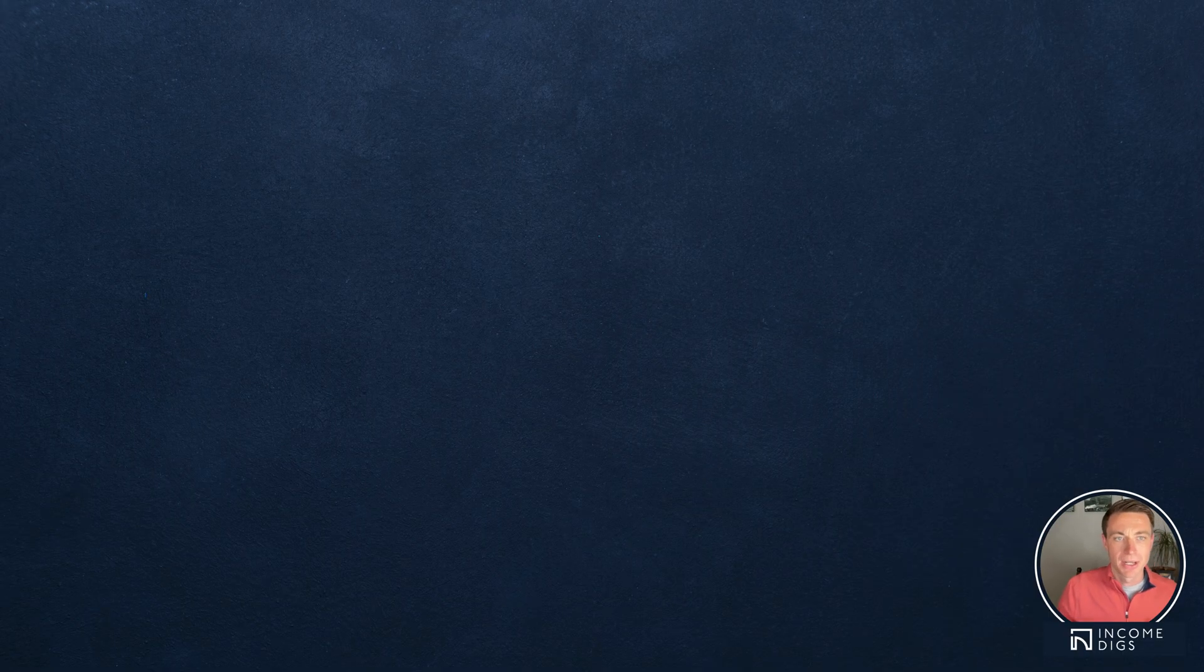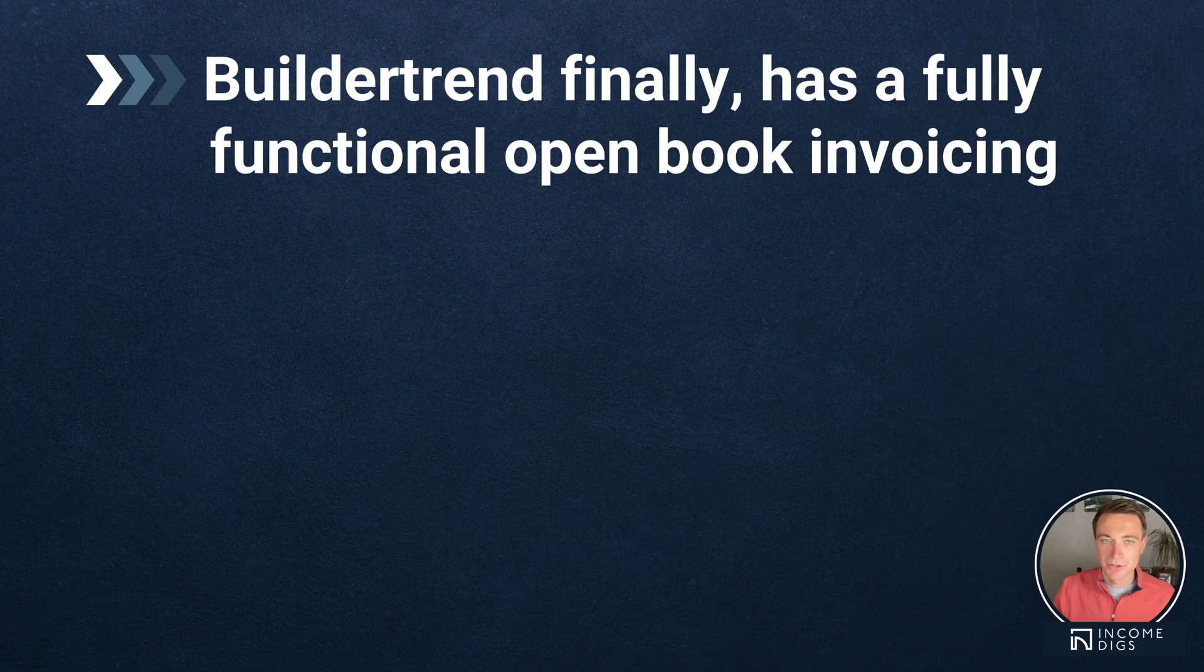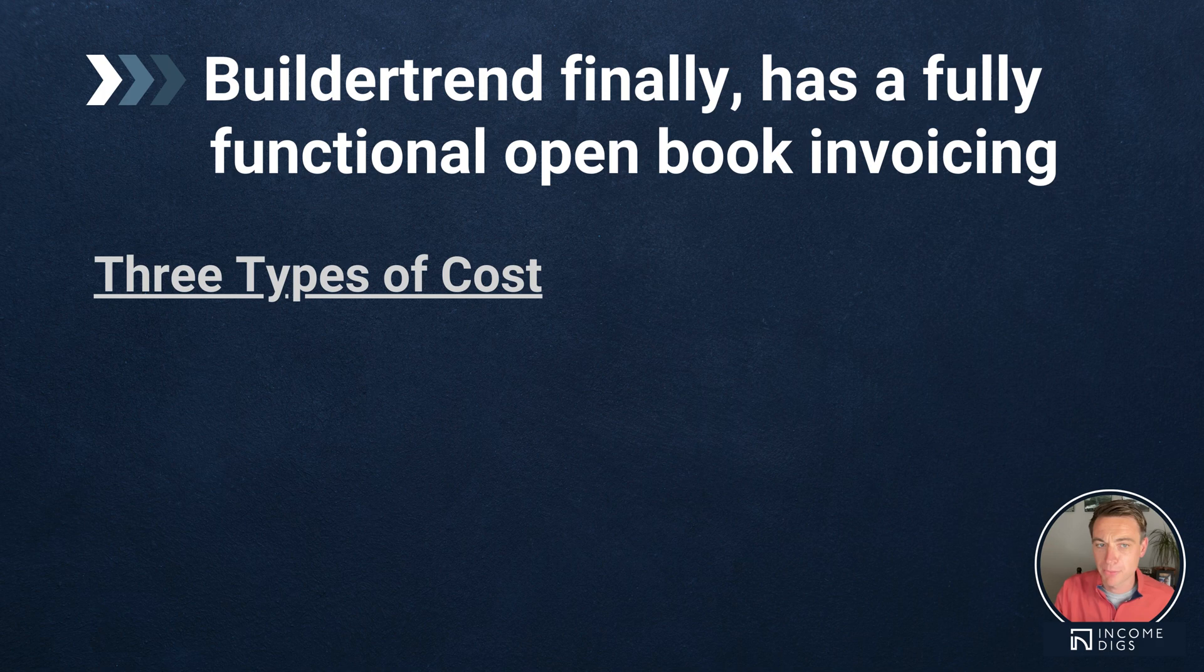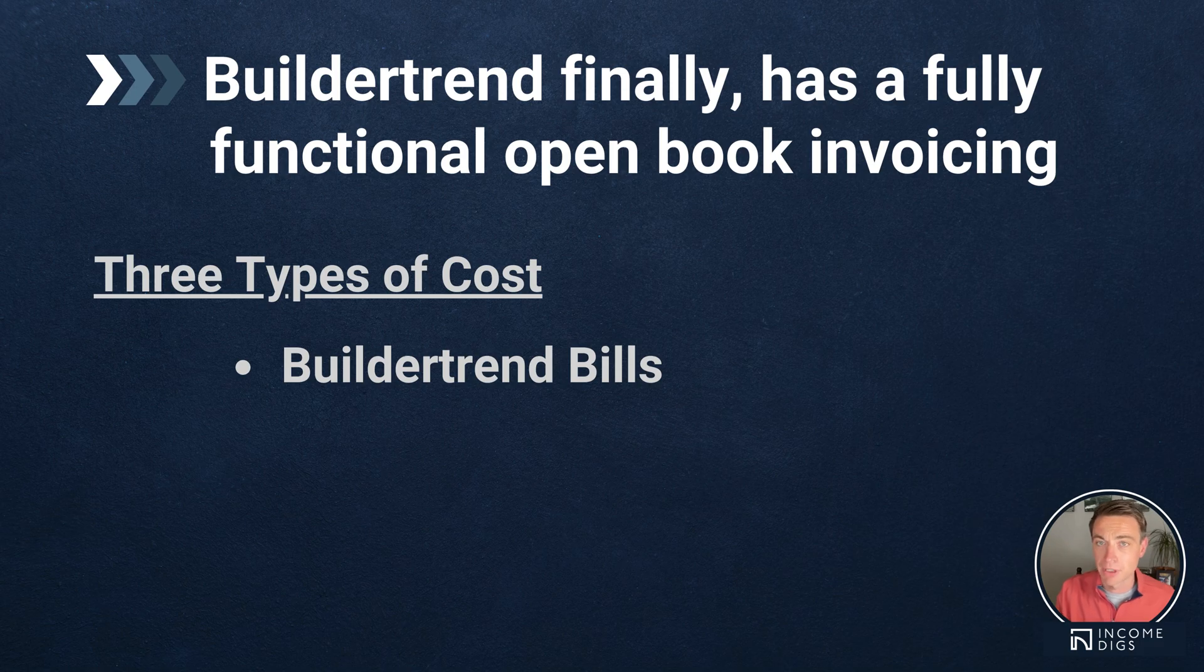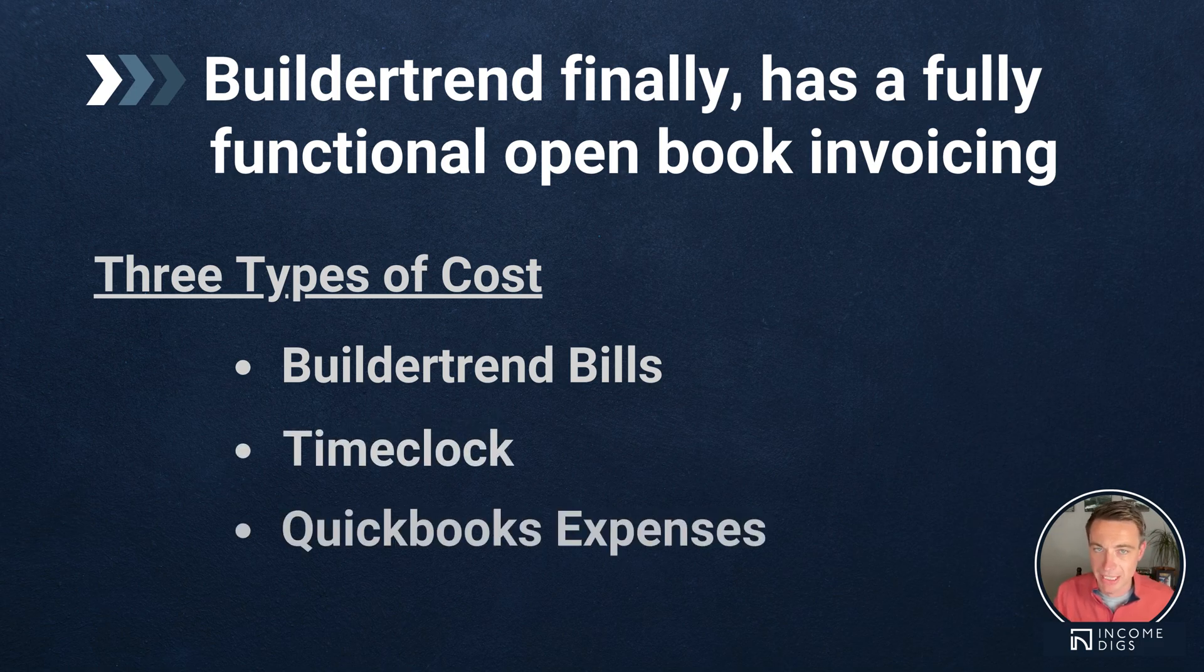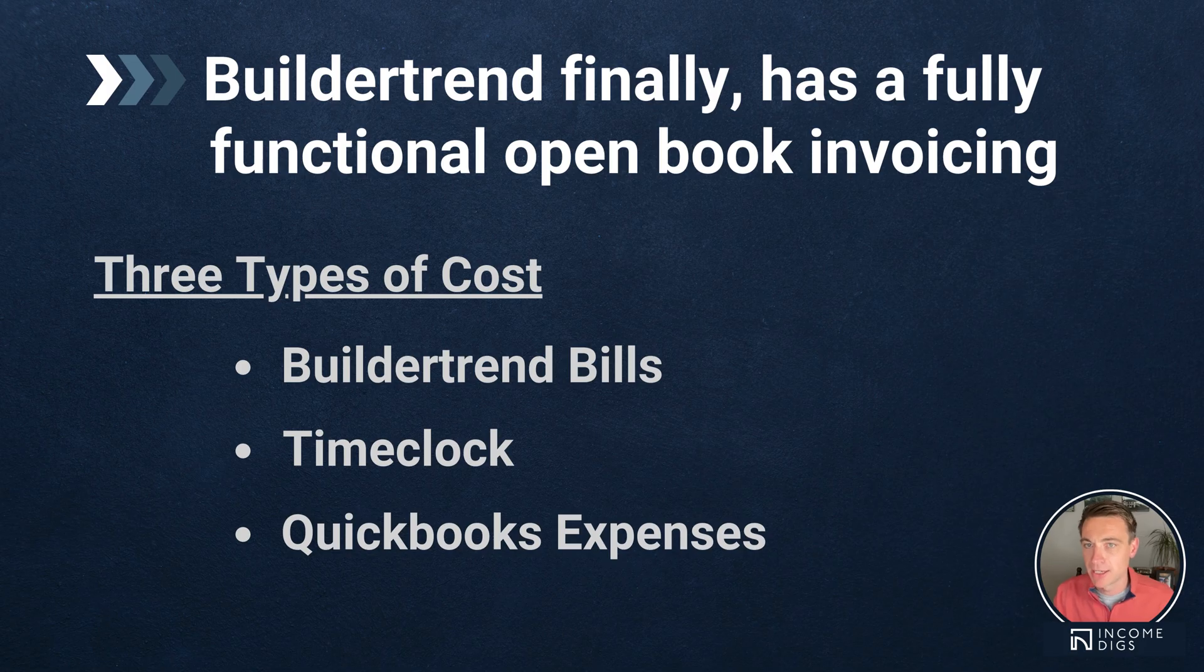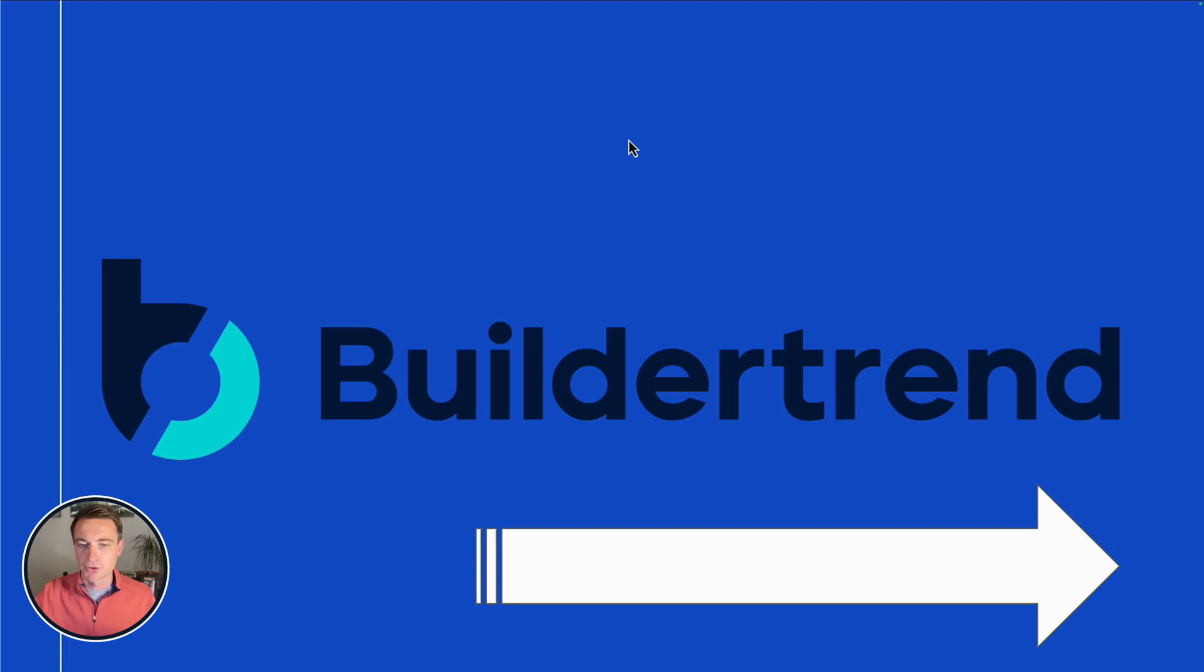So when we talk about open book invoicing and BuilderTrend is finally getting this fully functional. So what we're going to do is we're going to bring in the three different types of costs. This is what I do. I do these three different types of costs. You can bring in others. I'm going to bring in my bills from BuilderTrend. I'm going to bring in my time clock and my QuickBooks expenses. Now you can bring in change orders and you can bring in estimates and some other things. This is how I typically will do it. I'm going to show you exactly what I do within BuilderTrend.